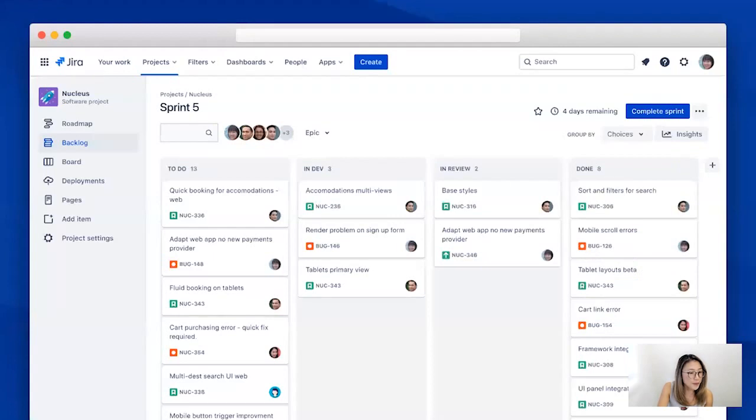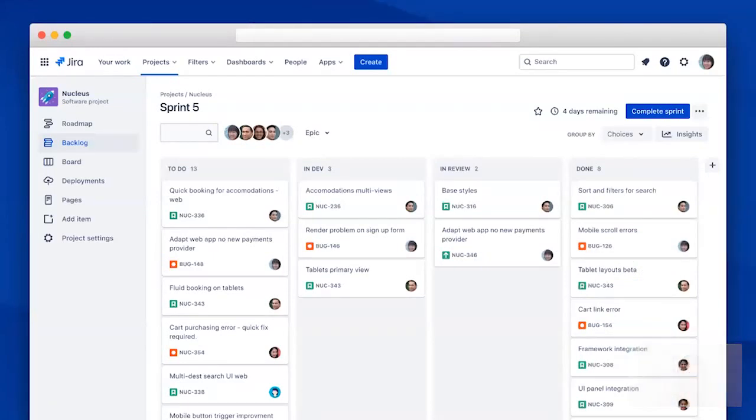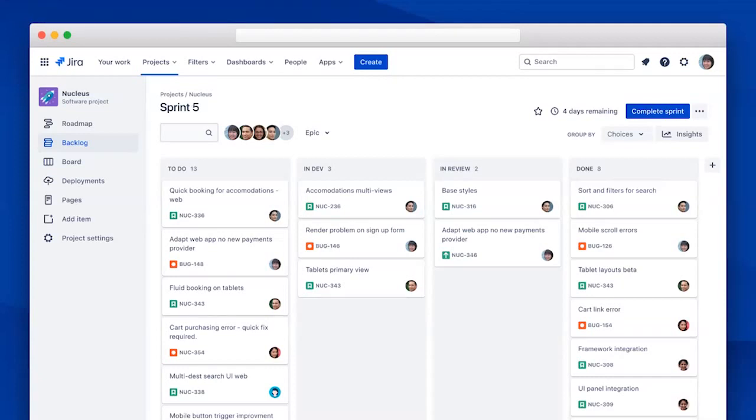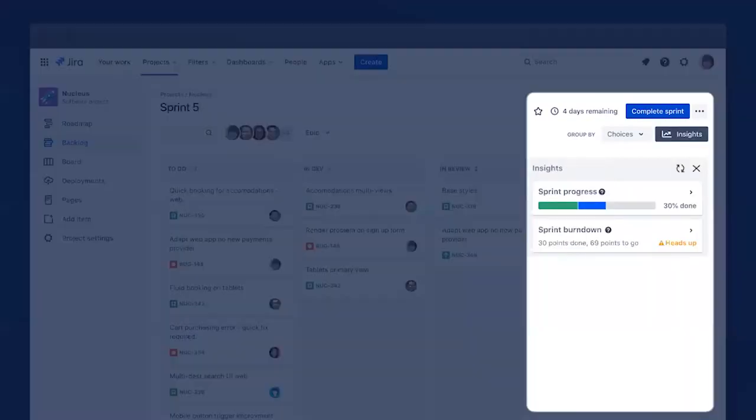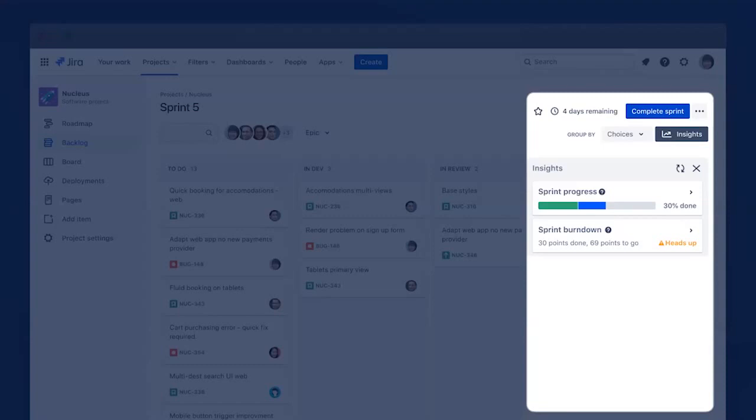Moving on to the board, let's say it's been over a week since the sprint has kicked off. Your team is in a daily scrum meeting and everyone is joining in the Zoom because, you know, that's the reality we live in today. And you're sharing the board on the screen to go through what everyone is up to. And you see there again, insights. This time you see different cards, one about sprint progress and another one on sprint burndown. And it seems like there are four days remaining in the sprint and yet only 30% of the work has been completed. And the burndown insight also suggests heads up. So let's click in to see what that means.